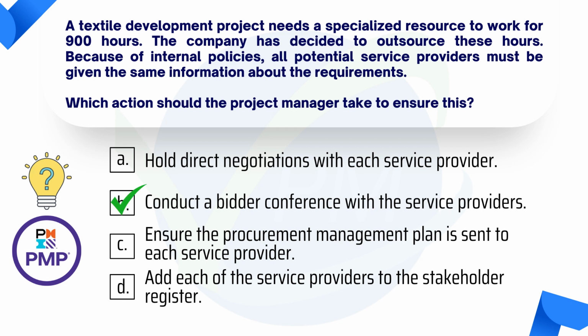So the answer is to conduct the bidder conference. You'd normally see in the procurement processes that it talks about a bidder conference. This is a meeting between the buyer and the prospective service providers. So it happens prior to any proposal being submitted. And you have one conference with all prospective bidders so that you have a clear and common understanding of what is required as well as all of the requirements that you have.